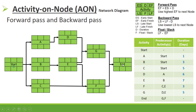The durations of the activities are: Start is 0, A is 1 day, B is 3 days, C is 5 days, D is 6 days, E is 7 days, F is 3 days, G is 5 days, and End is 0.